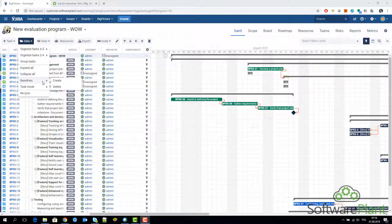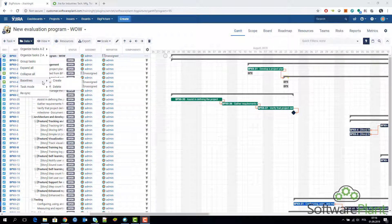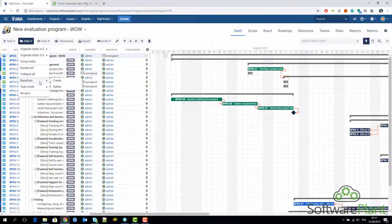The problem is that there can be only one baseline. Sometimes there are scenarios that throughout the life of the project maybe you would want to take several snapshots, several baselines, and unfortunately it's not possible to do it yet in Big Picture.